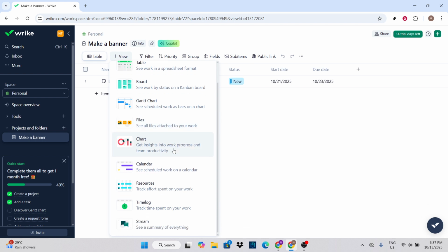Update your task statuses, such as to do, in progress, or done, to reflect real-time developments. Use reports to keep track of tasks that are complete or overdue, and create dashboards with widgets that display upcoming tasks of particular importance. The workload view is exceptionally handy for monitoring your team's capacity, ensuring no one is overburdened.